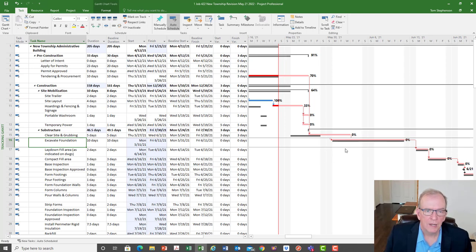That is the C in the direct method. Detect along the critical path, look for the immediate solution, look to reduce the cost, DIR, experiment, and then communicate. Get the commitment of the people involved, and this is going to help the team. So that's DIRECT, direct method.